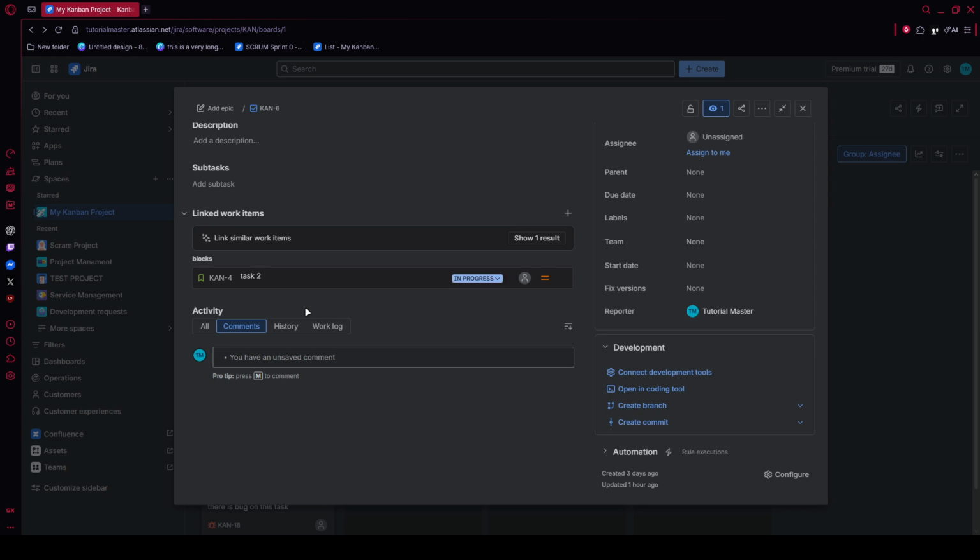If you prefer a more visual approach, you can also use Jira's timeline or roadmap view. Open timeline from the left side navigation, then find your task on the schedule. Hover near the edge of the taskbar until the small connection handle appears. Click and drag that handle to the related task, then release it. Jira will create the dependency visually, which can be much faster when working across multiple issues.